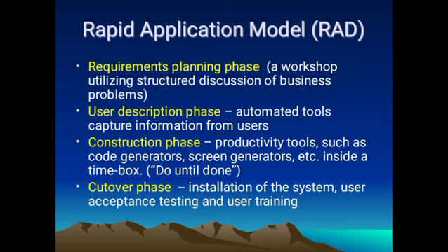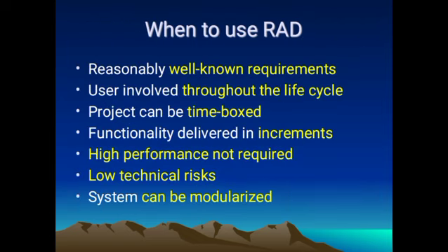Rapid application development model: requirements planning phase, user description phase, construction phase, cut over phase. When to use RAD: reasonably well known requirements, user involved throughout the life cycle. Project can be time boxed, functionality delivered in increments, high performance not required, low technical risks. System can be modularized.